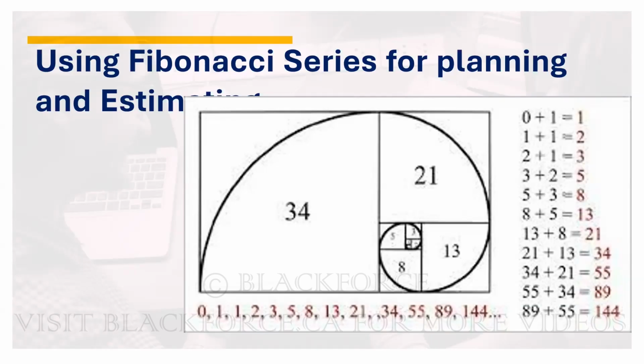Okay, so that's how the Fibonacci series works. Anything more than 13, you say this is an epic. So you take it to an epic. Okay, is it clear?